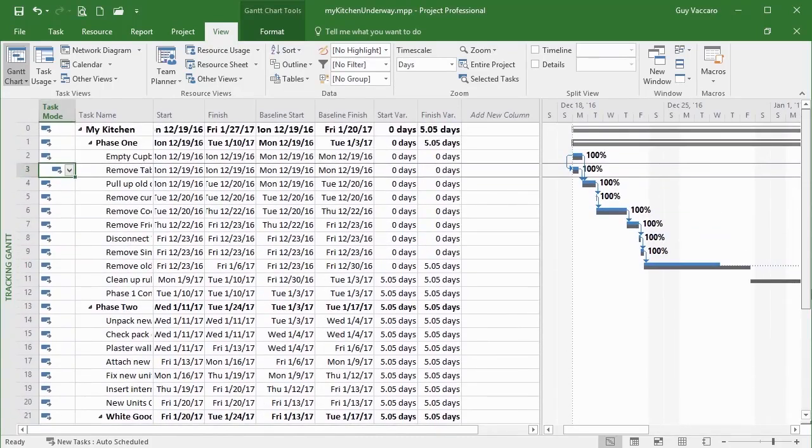Chances are that we will certainly lose some more time unless we're able to recoup some somewhere, perhaps by multiplying the amount of people that do a particular job to therefore make it happen quicker. So that's the variance table. Compares the start time, baseline start time, finish time, baseline finish time, and gives you the gap.